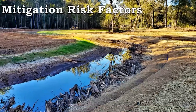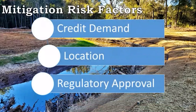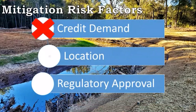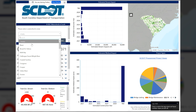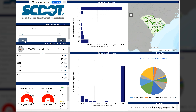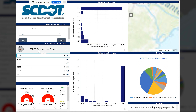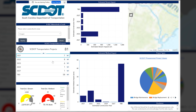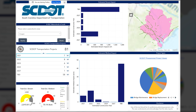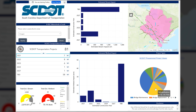The Mitigation Forecasting Tool, or MFT, improves SCDOT's transparency for environmental mitigation associated with project delivery. The MFT removed two risks associated with mitigation banking: mitigation credit demand and bank location. All users are now able to search by watershed to estimate stream and wetland credit demand. This feature will assist mitigation bankers in determining the location and size of future mitigation banks, based on SCDOT's anticipated future needs.